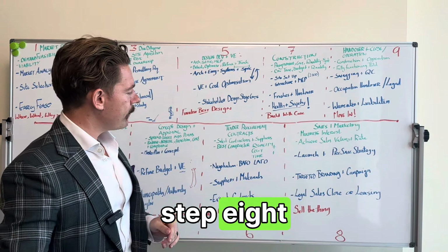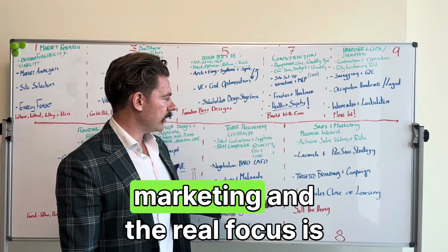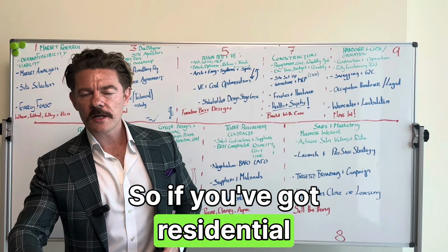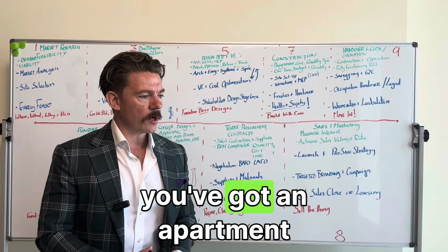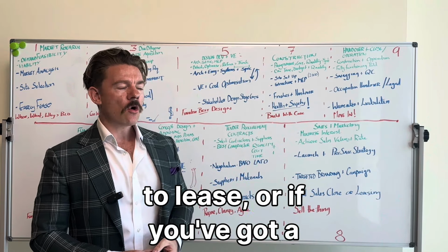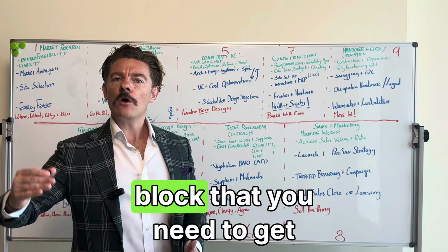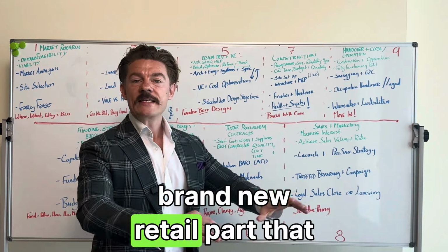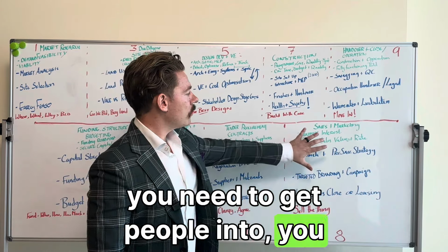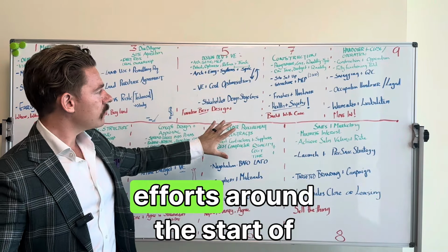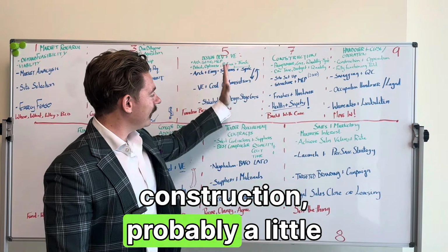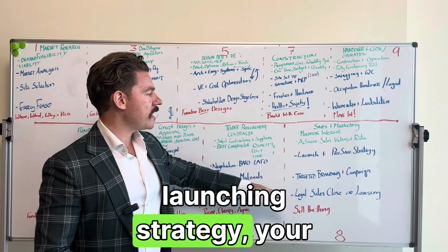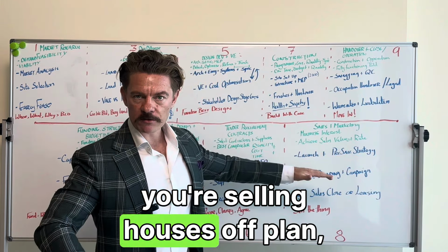Now we move into step 8, and this is where we're talking about sales and marketing. And the real focus here is to maximize the market interest. So if you've got residential homes that you're selling, or if you've got an apartment block of flats that you need to lease, or if you've got a new commercial block that you need to get offices or people moved into those offices, or a brand new retail park that you need to get people into, you want to be starting this sales and marketing effort around the start of construction, probably a little bit before construction, so you can start to build interest.